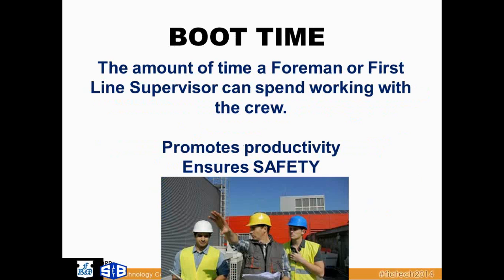Boot time is the amount of time that the foreman or first line supervisor can actually spend in the field working with his crew. This is critically important, is what they found out. This promotes productivity and ensures safety for the crew members. And what the studies have found is that foremen spend a lot of time running back and forth looking for stuff, finding stuff, gathering information, gathering materials. So one of our first objectives is to keep that foreman working with his crew, and IT, mobile IT, is going to go a long way in helping us to get there. Next slide.